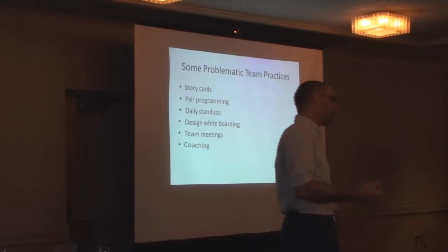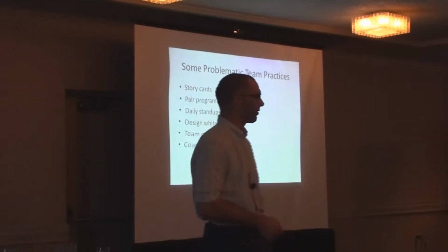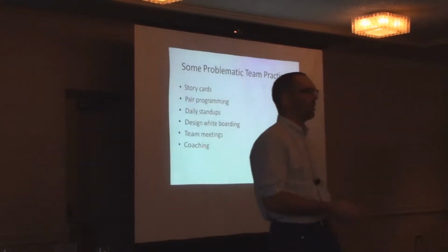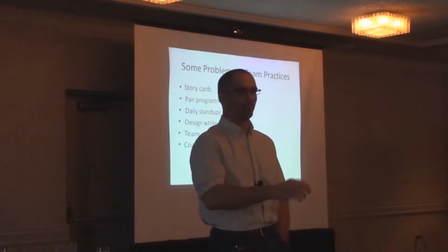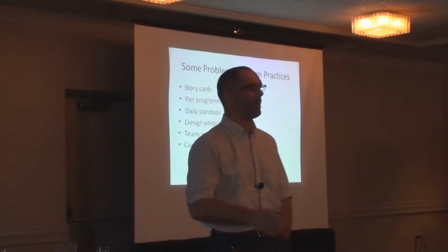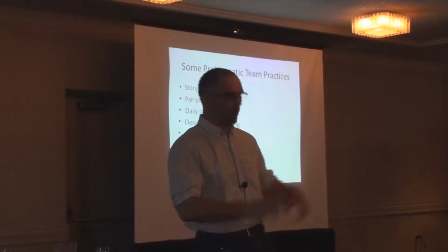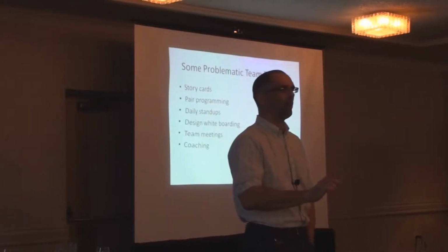And there are a whole load of problematic team practices that fall out of that. I mean, here are a whole bunch of them. I think story cards is quite an interesting one. If you have a story card, you think of it as, well, it's what this story is going to do. But really, actually, it's a placeholder for a conversation. Because a story card is this big. You're not going to write the whole story on it.